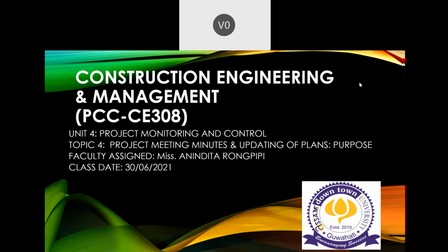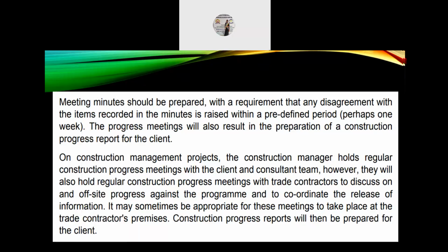So, good morning, students. We'll start our topic number 4, which is project meeting minutes and updating of plans. The purpose of updating of the project plans. So, first one, project meeting minutes. Meeting minutes should be prepared with a requirement that any disagreement with the items recorded in the minutes is raised within a predefined period, perhaps 1 week.